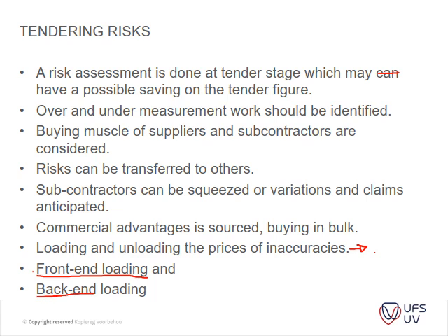And then obviously you get your back end loading, where you load some of your items at the back of your project. That might be, for instance, your finishes, etc. If you anticipate that that will assist you, if you can perhaps get certain items at a better cost, it might benefit you to load some of your items at the end of your project, or when you foresee that your cash flow might be low at the end of the project, you can load some of the items there.